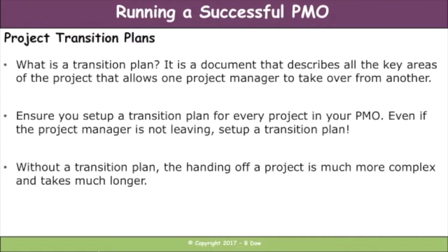Okay? The next step in the process is transition plans. So what's a transition plan? Well, it's a document that describes all the key areas of a project for one PMO or for one project manager to take over from another. Every project needs a transition plan, right? Even if the project manager is not leaving, set up a transition plan.